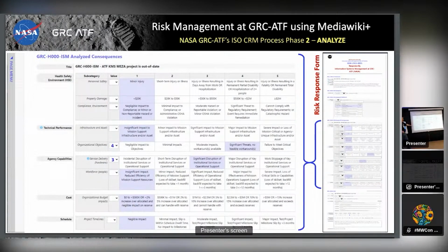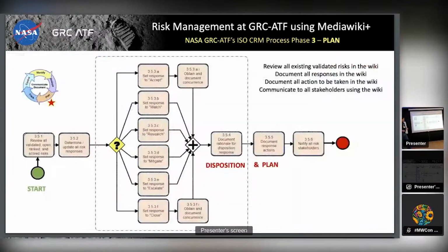At the bottom, you have cost and schedule. Every project manager knows the concerns of a risk impacting their cost and schedule. The agency has a couple of other categories. At the end of the day, we have to go through these and rank them 1 through 5. And again, we rank them at our level. Our parent organization ranks them, and all of this information can then be aggregated to make what's called a risk-informed decision.